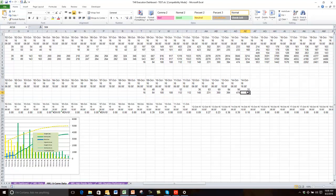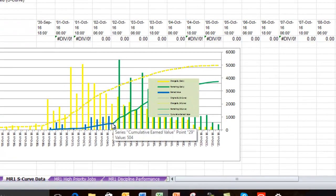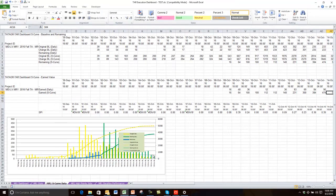If I don't stop this report at the data date, and I'll show you where the data stops here — if I don't stop that report at the data date, these last numbers will continue. The cumulative line will keep going to the right and continue to, say, 504 hours. What that results in is a blue flat line running all the way across the graph, and I would have to manually clear those cells to make it disappear. If I run the report separately in P6, I can tell it to stop at the data date, and that makes the blue line stop at the right point without having to clear anything.